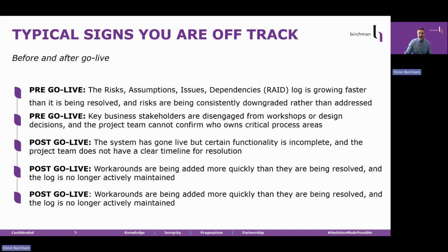When workarounds are being added faster than the underlying system is being resolved and the RAID log can no longer be actively maintained, then the program has accepted that the system will not be fixed in a structured way. Each workaround adds technical debt and makes eventual remediation more complex. They also tend to be invisible to anyone not close to the operational detail, which is why leadership teams are often the last to understand how extensive these have become.